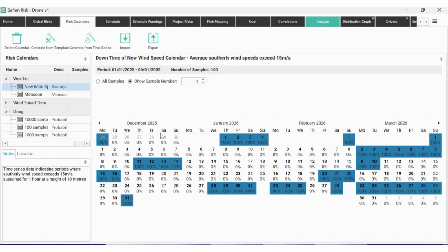So we're not using it for things where we know with any certainty that there's going to be an impact of an extra public holiday. We're looking to really just use this for modeling risk events which are uncertain, and where the uncertainty varies according to the time of year. So we've got 4 different ways that we can do this.